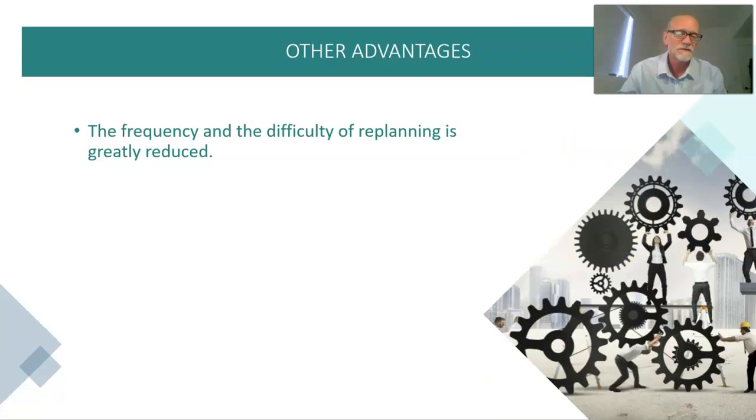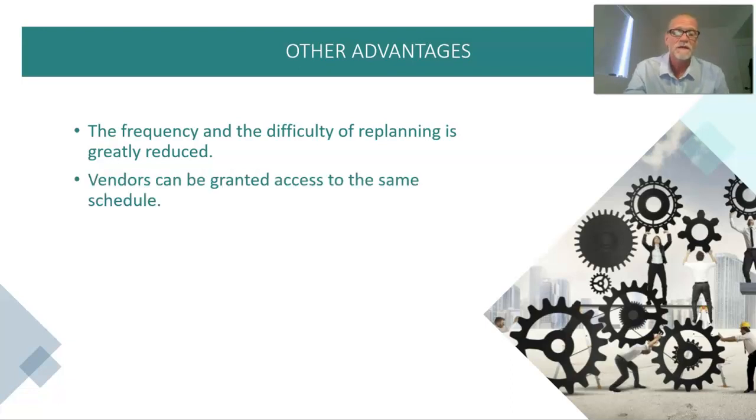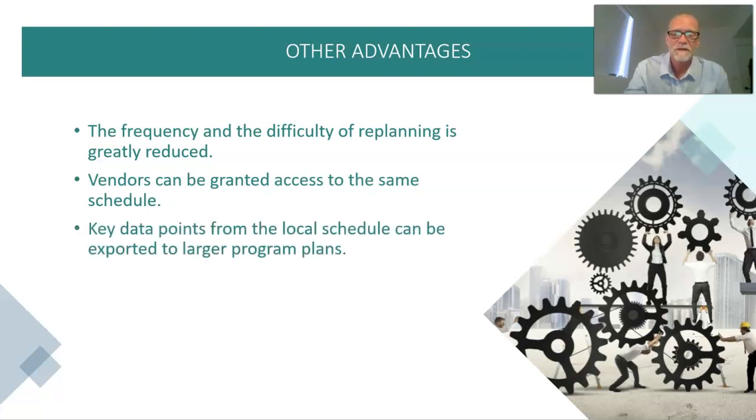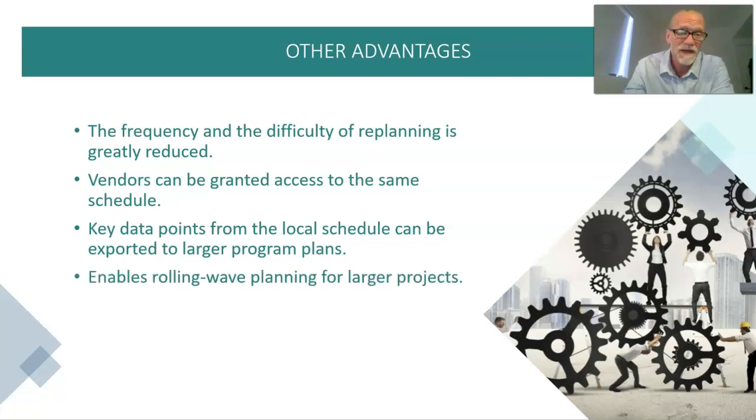Other advantages: we talked earlier about the difficulty of replanning, so that is reduced in both frequency and difficulty. We can grant vendors access to see just certain points in the project if necessary. Key data points within the local schedule can be exported to a higher level plan, like a Primavera plan for large government projects and so on. Rolling wave planning is more quickly enabled.